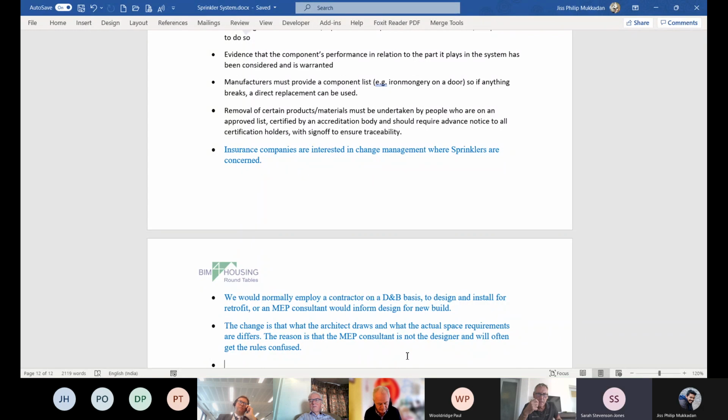Yeah, I mean, in previous organisations I've worked in, we've done almost ballot situations where we set a minimum standard that we won't progress with the project unless we've got X percentage of individuals that have agreed for access. And if it's a small percentage of people who are preventing access, we will simply pipe up to the door and continue dialogue.